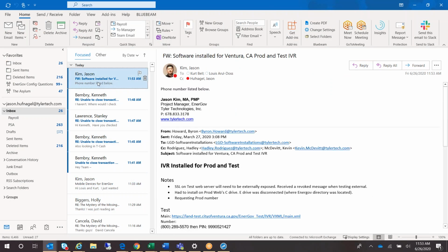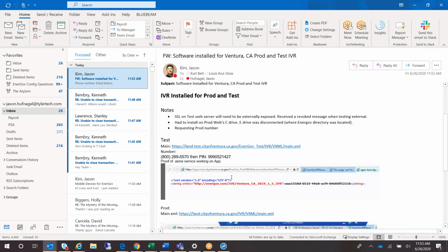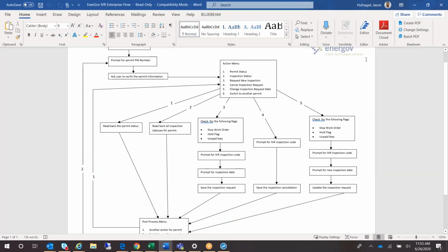Got it. All right. So I would be more inclined, like Kurt and Jason, I'll support this to go live with the end of the CSS phase because this is something we could do since it's already there, installed and configured, and we just need to do a couple of meetings and make sure we configure those IVR inspection codes. But the payment processing is a bigger task. I would defer that to a later date. I don't want to have payments on through IVR at this point because I did this for Riverside County multiple times, and that's a time-consuming one. That needs to be postponed.